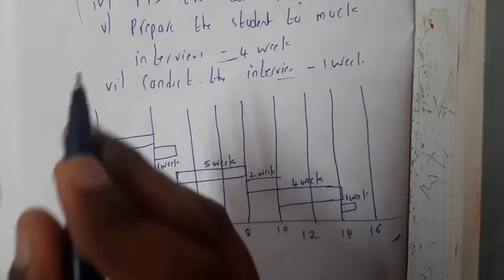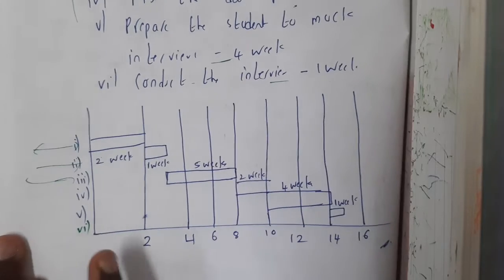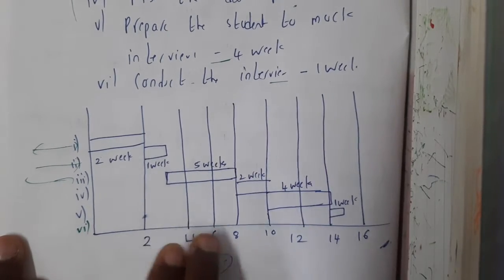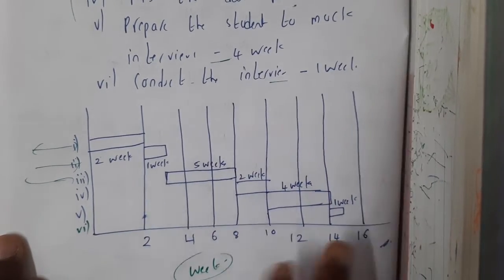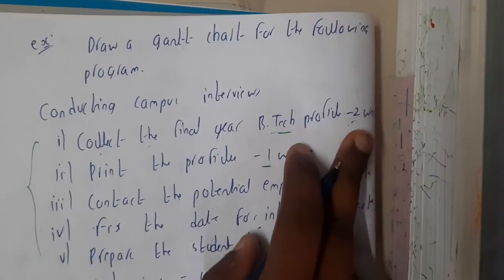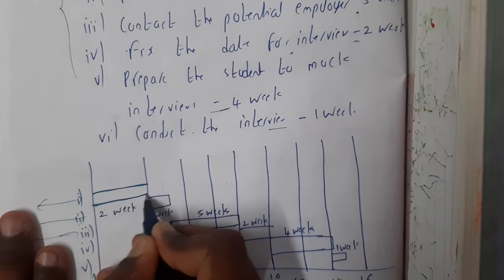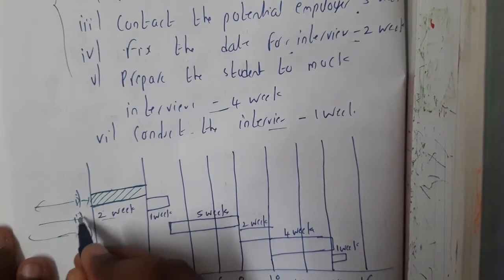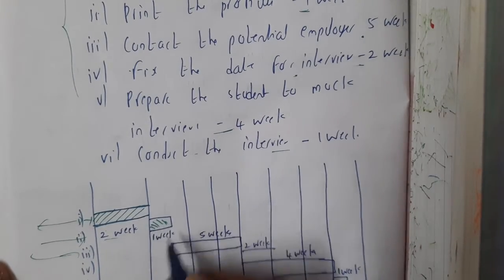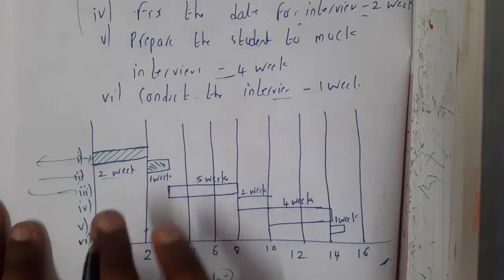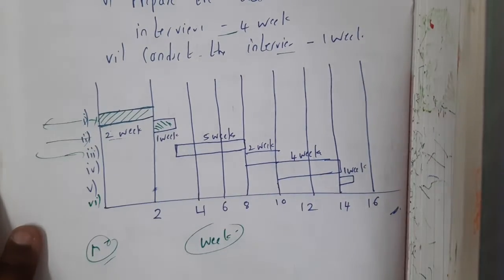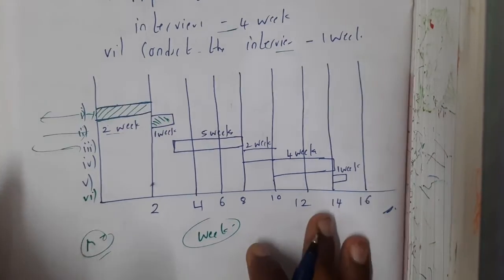These tasks with their respective times can be represented in a Gantt chart easily. On the y-axis you write the activity or statement, and on the x-axis you write the time intervals. Here we took weeks with an interval of two weeks: 2, 4, 6, 8, 10, 12, 14, 16. For the first activity, collecting the profile, a bar is drawn spanning two weeks. For the second activity, printing the profile, a bar is drawn spanning one week. Each bar indicates how long that activity will continue. Faculty may also ask for these Gantt charts in major or mini projects.